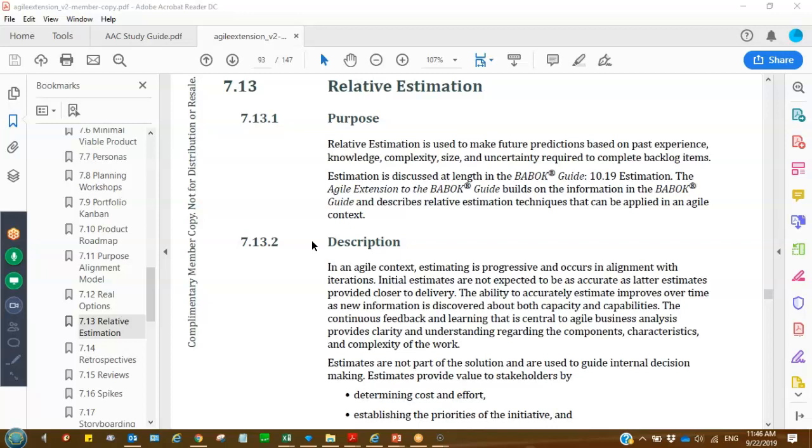We want to be able to line things up and say, okay, we've got all of these pieces that we're going to work on, and all of these pieces are smaller than a loaf of bread. So no matter which one we choose to do at any particular point in time, we can say, with a certain degree of reasonability, that it will take us somewhere around this long. We can deal with our ability to deliver. We can bucket it and say it will be about this long relative to the other things that we're doing.